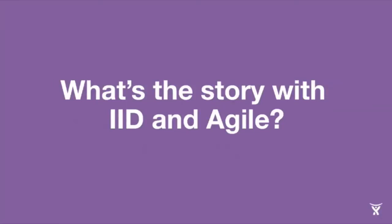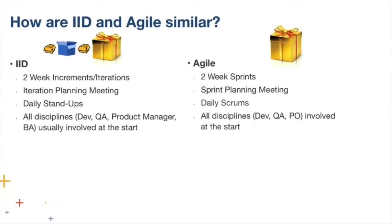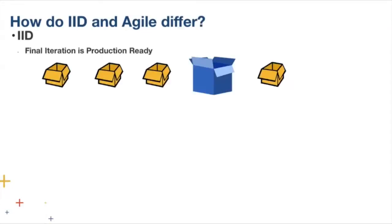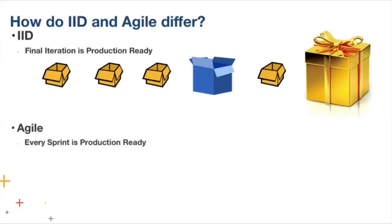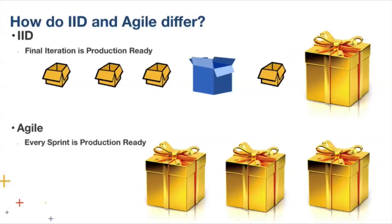You might say IID and agile sound similar — and you're right, there are some similarities: two-week increments versus two-week sprints, iteration planning versus sprint planning, daily stand-ups versus daily scrums, everybody starts around the same time. But that's pretty much where the similarities end. The key difference is that IID focuses on delivering that last build to production, whereas in agile, every build has to be production ready. That is a very different way of working.